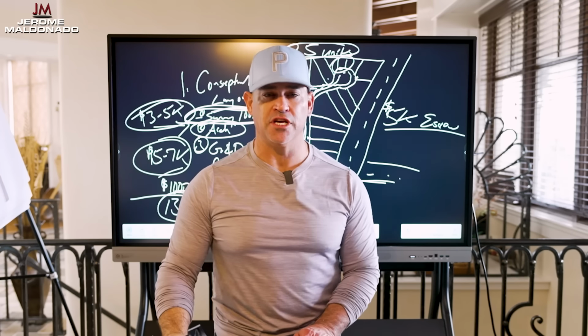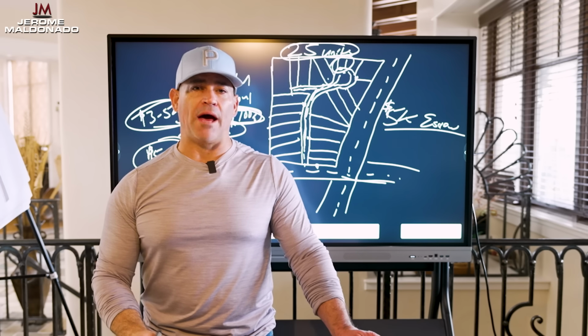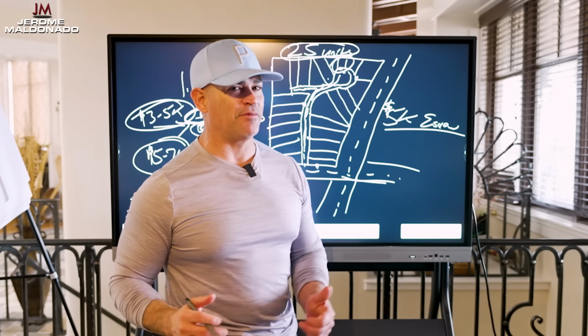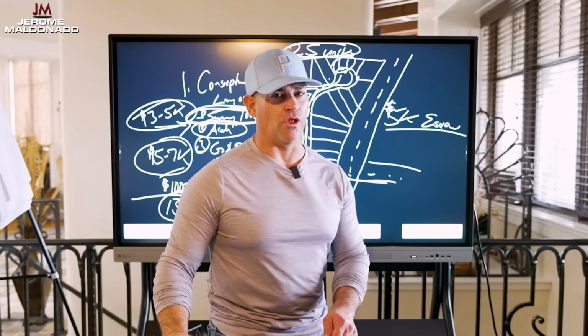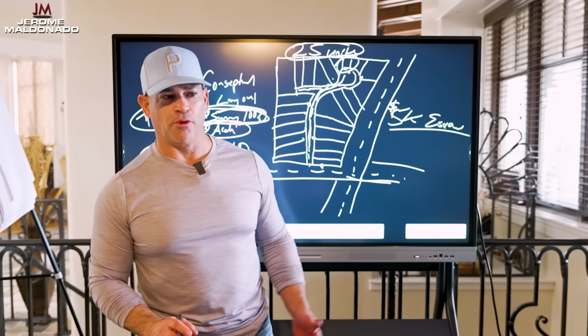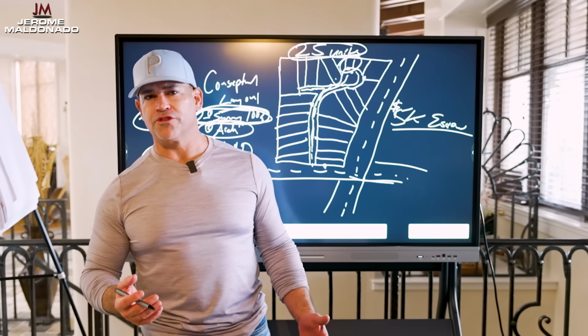The second contingency is based on all municipal approvals, okay? So that means that you're going in, you're going to get 25 lots, but 25 lots not just subdivided, because if you get 25 unusable lots, you can still subdivide 25 lots. But if it's 25 lots that are unusable because you can't get utilities there or you can't get all municipal approvals, then they're worthless lots.